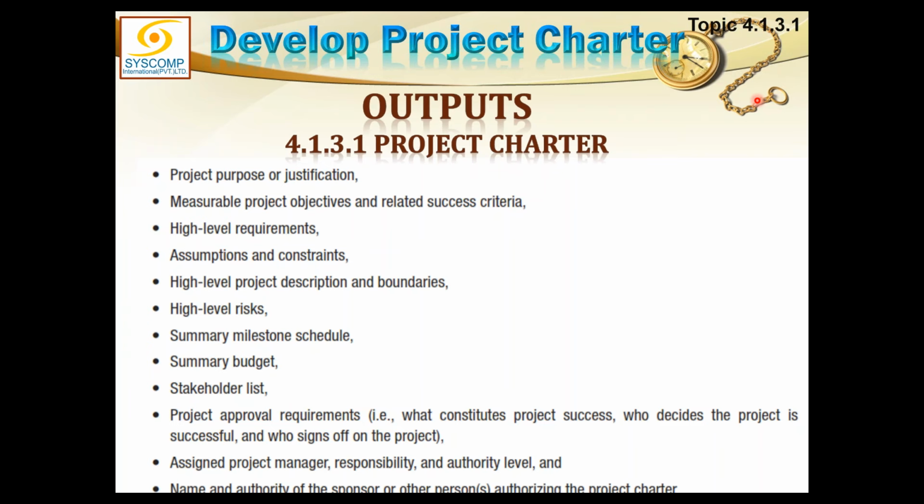So therefore, you as an organization will develop your own format for the charter, but generally it should give the purpose of the project and it should justify why we are doing this project. The project objectives defined should be measurable. They should not be hazy. And we should clearly be able to define how the success criteria will be established.